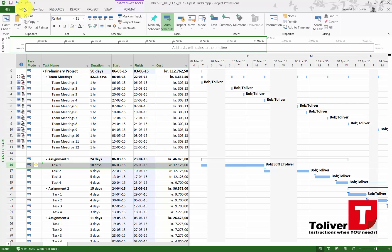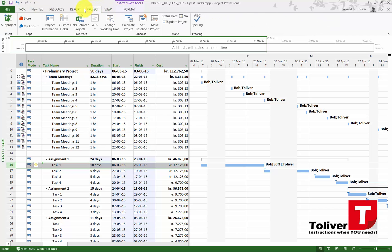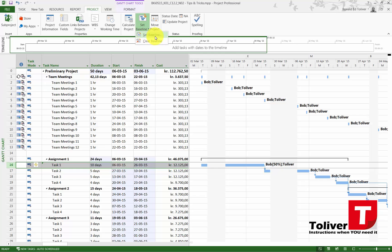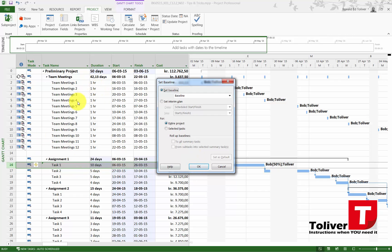Under project you need to set baseline like this, and then set baseline on entire project and OK. Once you've done that you cannot do any alterations in your plan because it's now ready.